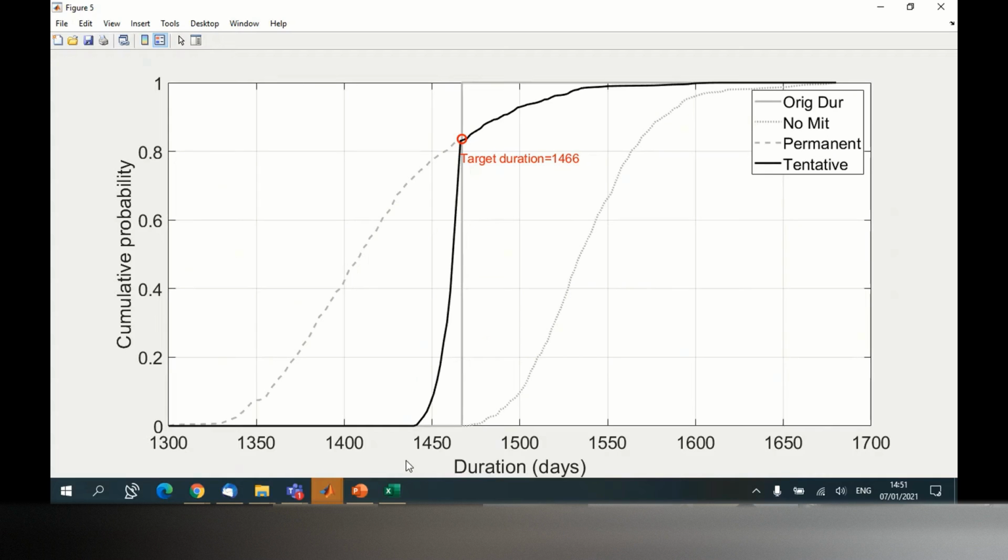But that's something you cannot control because it can just happen that it takes more days. Okay, so you cannot play with that, the duration uncertainty. What you can play with, what you have control over, is the mitigation measures, the type of mitigation measures, and the quantity of mitigation measures. Okay, so you are providing mitigation measures, solutions to reduce the duration of activities.